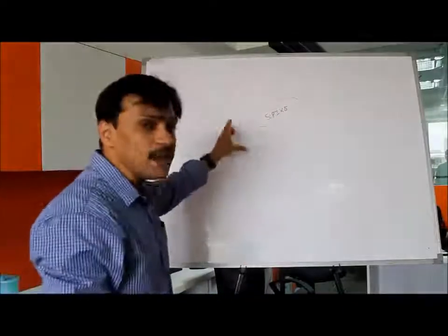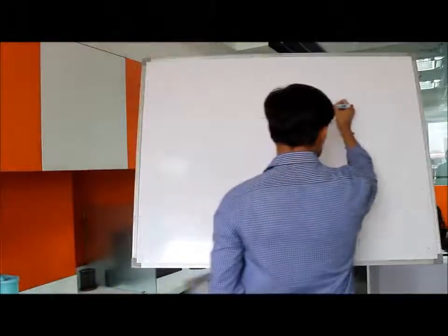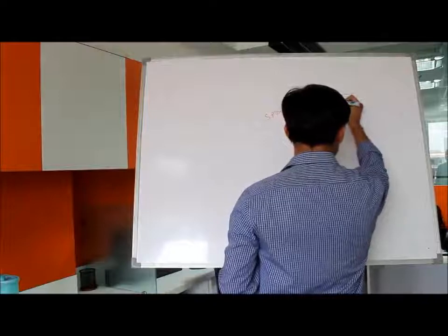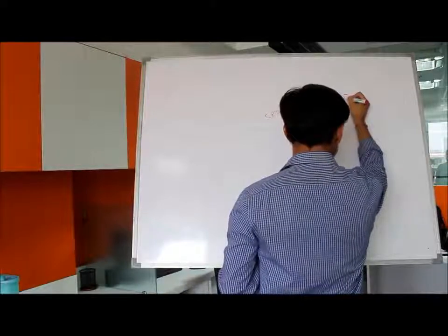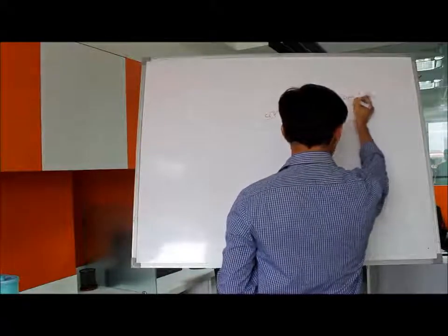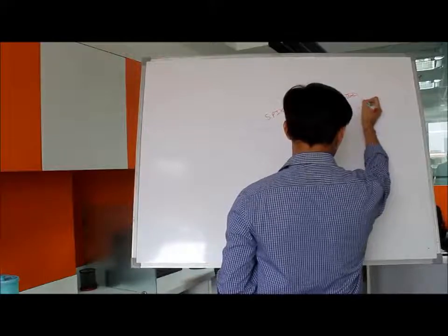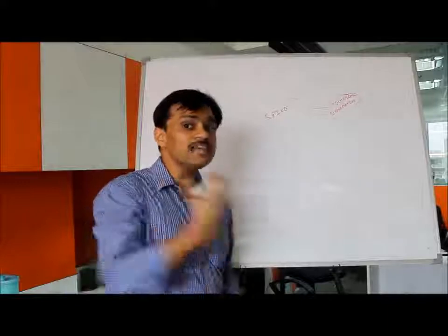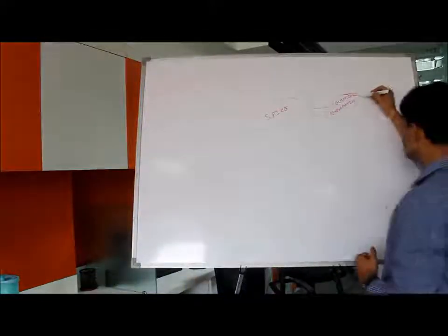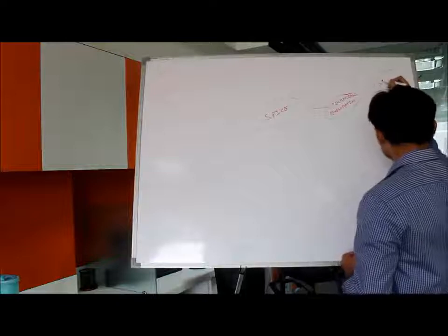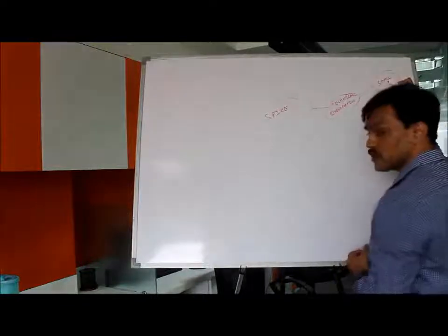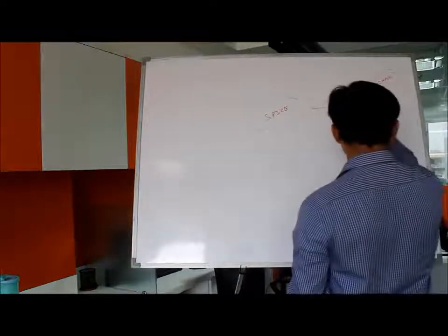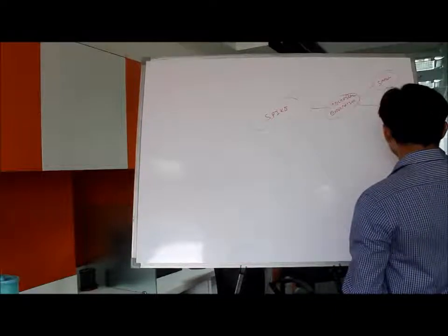Spike is a technical exploration. So we do a proof of concept, we explore the technical alternatives by performing spikes. Usually the spikes are small and we do an isolated experiment. So spikes are technical explorations, they are small in size, we may take 15 minutes to half an hour for performing this particular exploration, and they are isolated.